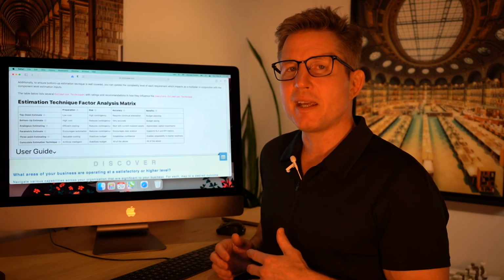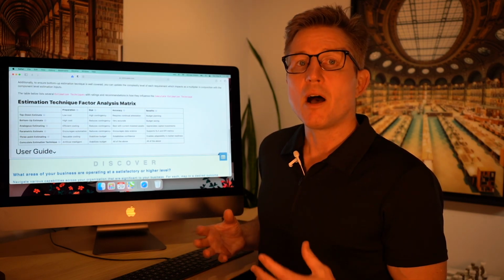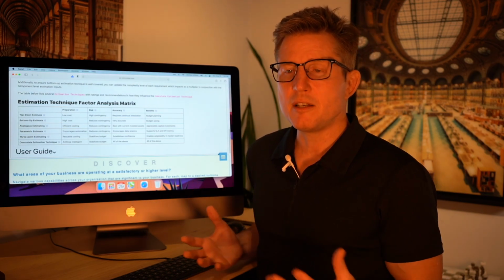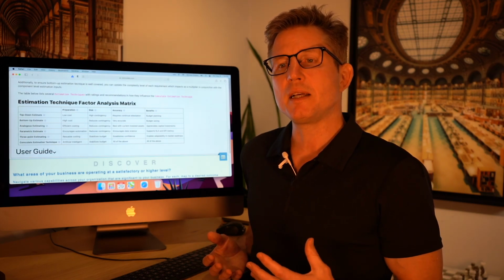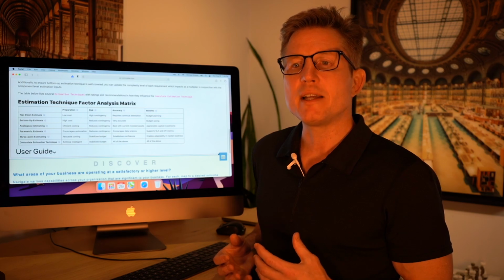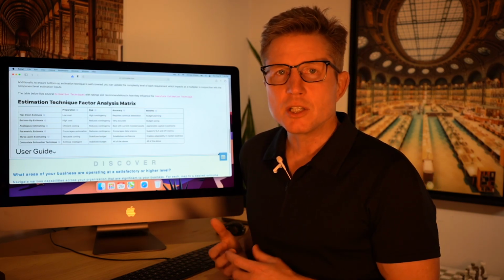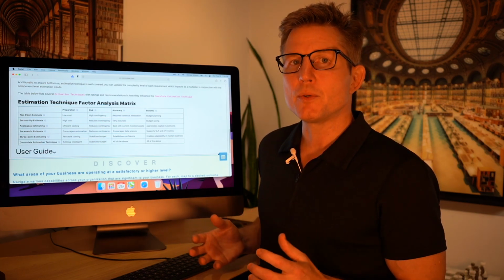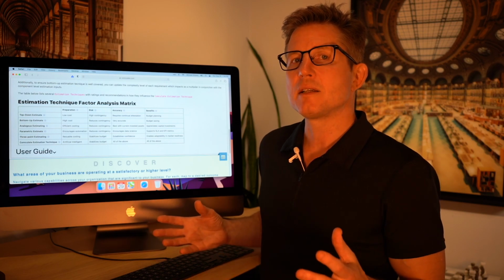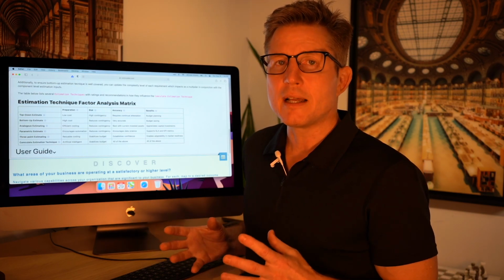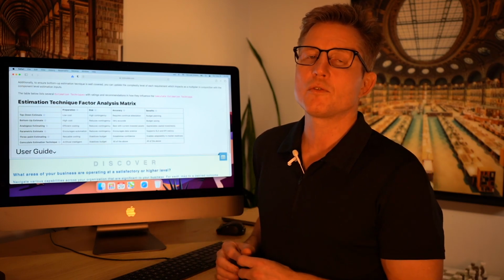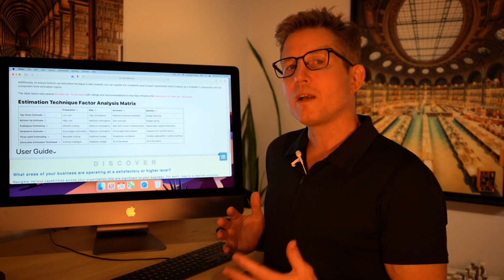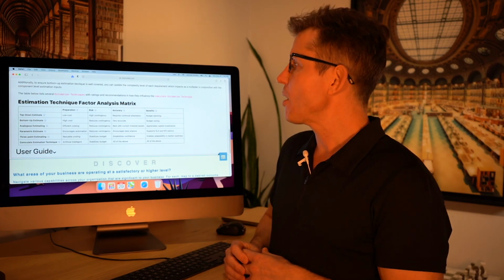Or you'll notice in some cases, let's say you have a highly competitive project where you have different vendors or individuals competing to participate in that project, they most likely will provide you the lowest possible budget to move forward. But then as you go from top down and as you decompose what you're actually going to deliver, you realize that your budget is not as little as you were first told, and you find your budget grows over time as you get more information. So that's one of the accuracy points of the top-down process.